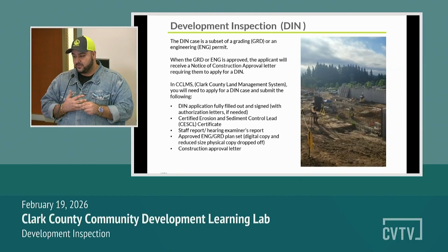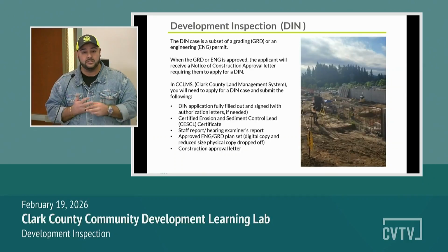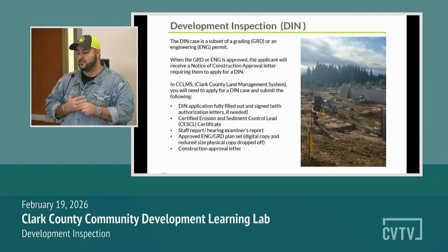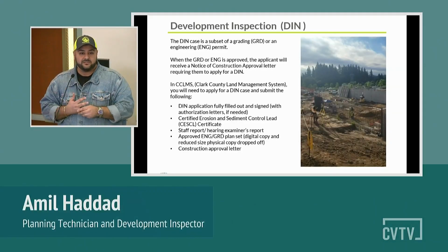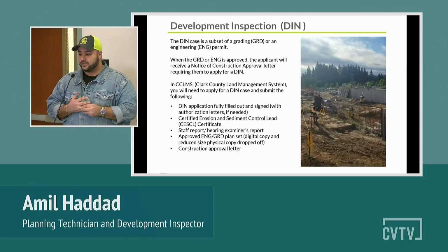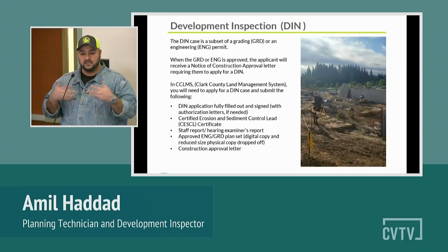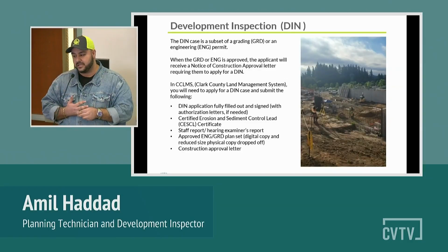So the DIN application is very important. And then we also require a certified erosion and sediment control lead certificate. In short, we refer to that as the CECL. That is one of the requirements for the upload. And then we require the staff report or hearing examiner's report. To you, that may or may not make much of a difference, but depending on the type of the project that is being reviewed and the capacity, you'll have one or both of those reports that we review. In short, that is land use, preliminary application, pre-application conference, all that stuff coming together to have a set of conditions, reviews, findings on the property, things that we actually review before you get to your engineering, stormwater, and then of course myself, which is the DIN case.